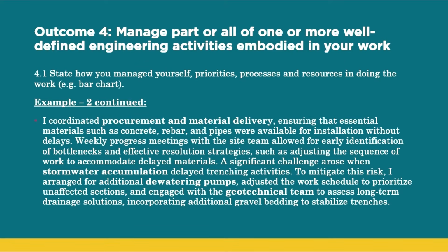I coordinated procurement and material delivery, ensuring that essential materials such as concrete, rebar, and pipes were available for the installation without delays. Weekly progress meetings, which were on site with the site team, allowed for early identification of bottlenecks and effective resolution strategies. So we are basically explaining how you ensure materials, which are resources, are available without delays. I arranged for additional dewatering pumps in the event of water accumulating in trenches. So we are basically explaining how you manage activities within the site.